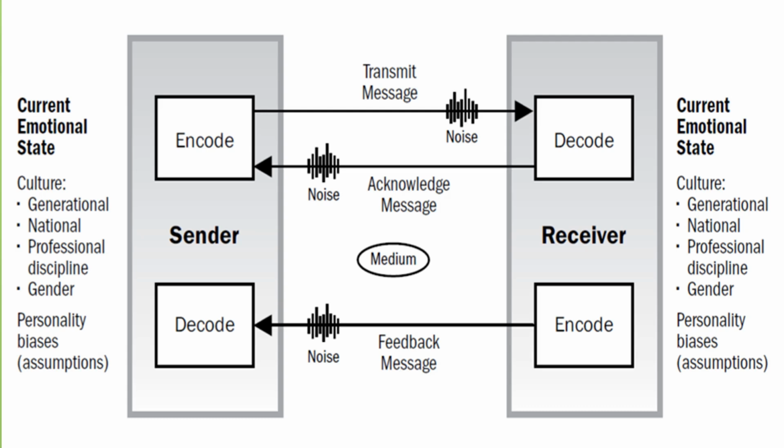The communication model shown in the figure in front of you on the screen incorporates the idea that the message itself and how it is transmitted are influenced by the sender's current emotional state, knowledge, background, personality, culture, and biases. Similarly, the receiver's emotional state, knowledge, background, personality, culture, and biases will influence how the message is received and interpreted, and will contribute to the barriers or noise. This communication model and its enhancements can assist in developing communication strategies and plans for person-to-person or even small group-to-small group communications. It is not useful for other communications artifacts such as emails, broadcast messages, or social media.